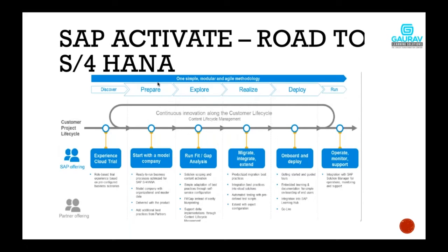Fit gap analysis document. Fit means, let's say you are explaining accounts payable to the users. In the workshop, you explain how to create a vendor master, what a vendor account group is, what the number ranges are. And there itself, the customer has given you the list of account groups that they want to use, and the number ranges that they want to use. Those things are available in the standard system. So you will just write that this particular requirement completely fits into the system, so there is no modification required.